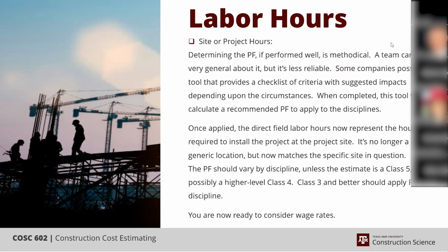Yes. So it's important to know whether your base database hours reflect just a generic basis, or whether they are US Gulf Coast, and whether they've been brought current and reflect all the current safety precautions or practices that your company follows. Some companies are very, very safety conscious. Others are moderately safety conscious. So each company has to make its own assessment: this is how we operate.